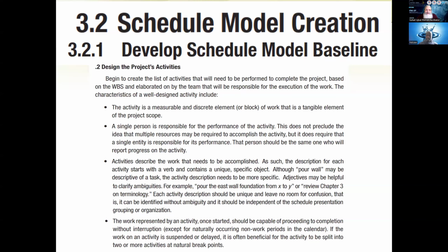So the characteristics of a well-designed activity include, and these are again very interesting and noteworthy points: the activity is a measurable, discrete element or block of work that is a tangible element of project scope. It should not be kind of a hearsay or something.